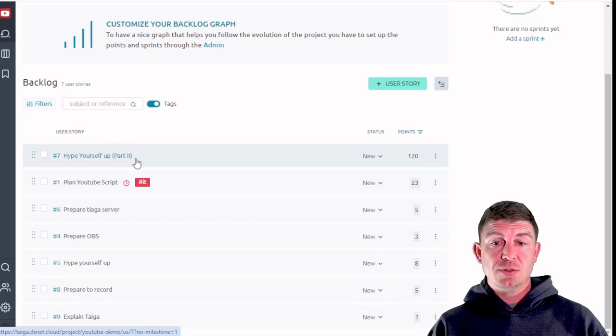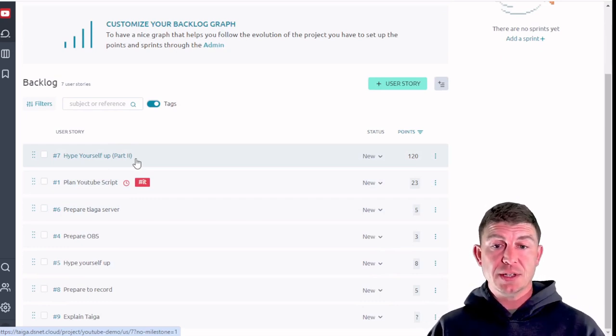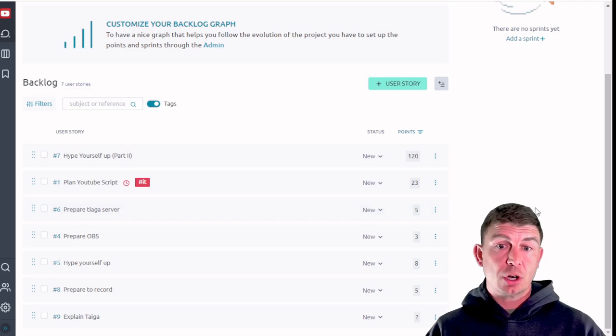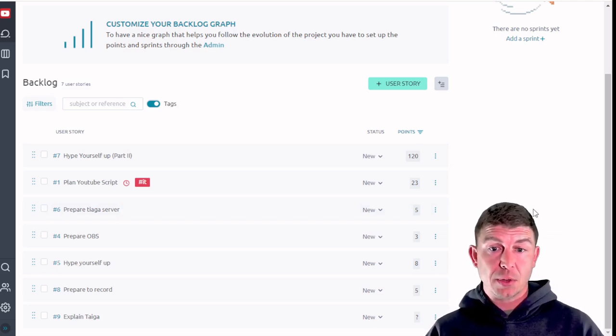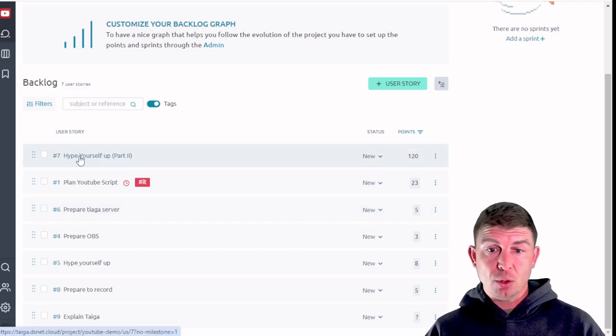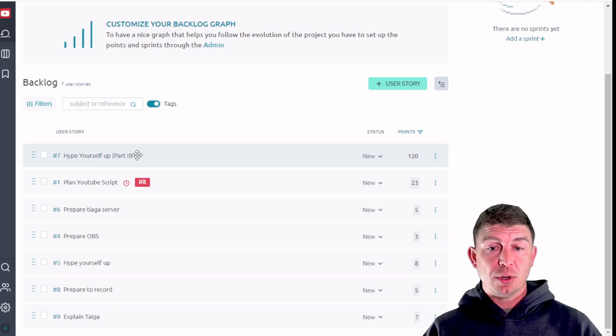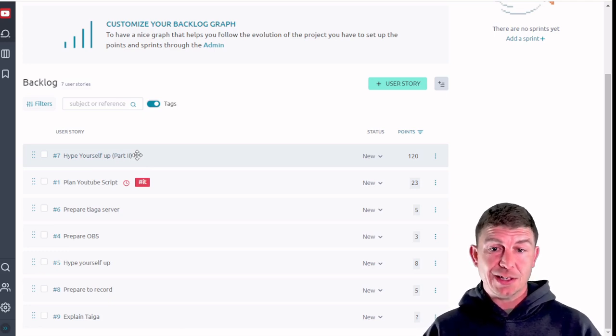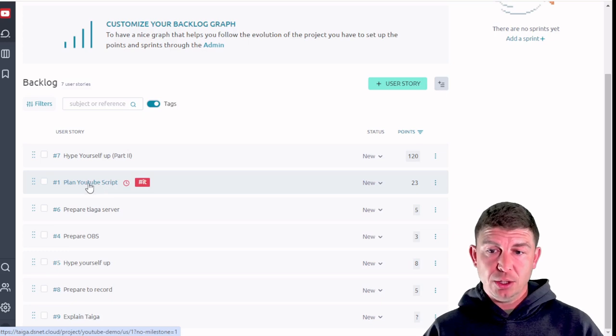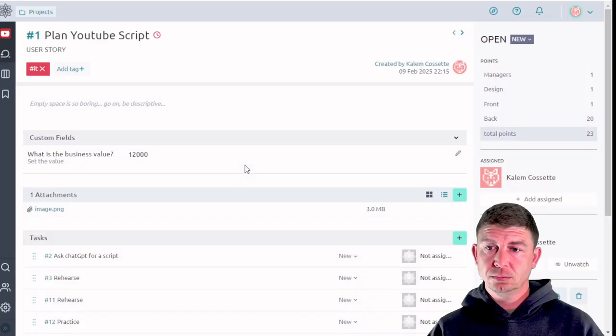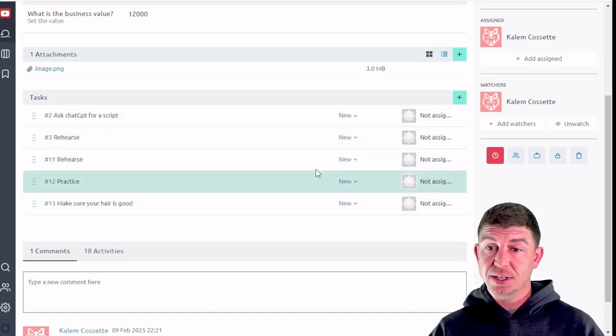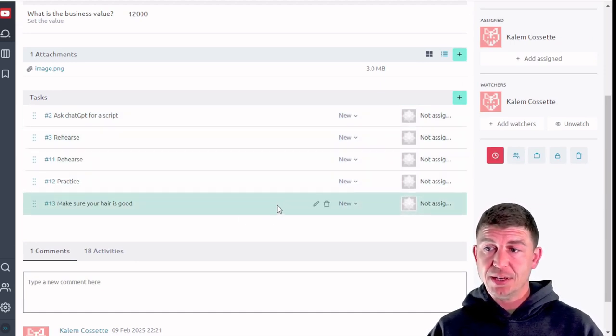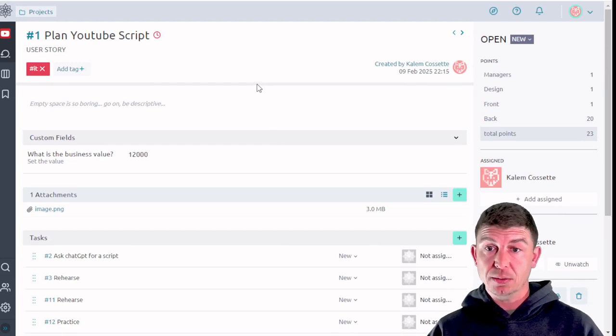So let's use for example a user comments and says that he wants dark mode to be a functionality in my web interface on my software. So integrate dark mode might be the user story and there may be a number of subordinate tasks that exist to accomplish that. So from the previous example plan YouTube script, if I go into that one you'll see that the subordinate tasks exist here. These are the tasks that have to get completed in order for this user story to be completed.